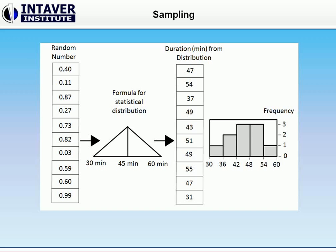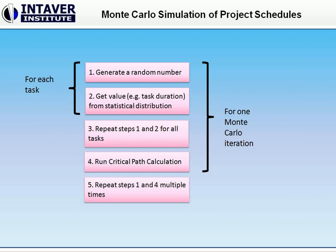Monte Carlo simulation of the project schedule includes five steps. Step 1: generate a random number for each task. Step 2: get a value from the statistical distribution. Step 3: repeat this process for all tasks, so the duration value will be taken from the statistical distribution for all tasks. Step 4: enter the duration values obtained from the statistical distribution into the critical path calculation algorithm. In our case, the total duration will be the sum of the washing and drying times.